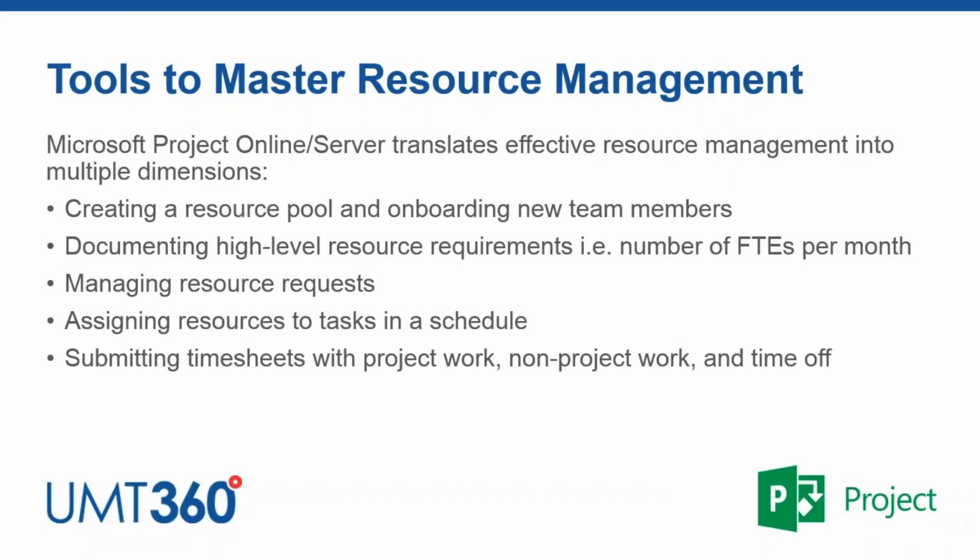And last but not least, once you have a schedule in place with resources, some organizations have a need to actually update those tasks as they go, for a project manager to understand what's done, what's not done, and what is left to do. And this can be done in the context of the timesheets as well. So here there's another connection point between a project manager and maybe a functional manager who's more focused on understanding and making sure that their team is working, say, 40 hours a week, plus or minus time off or other regional constraints, for example.